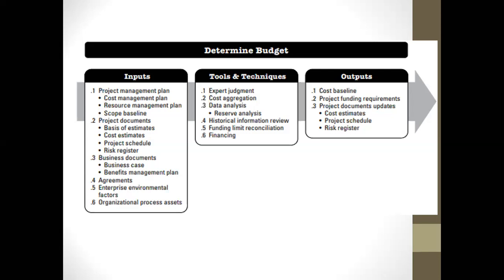If you go back to your stakeholder and tell him that this thing we budgeted at this is now maybe 25% more, and this is going to increase the project cost by 25%, some of the project managers will tell you, wait, let's see whether the price will come down. That's the changes we are talking about. If he says, okay, just go ahead, I will give you the 25% increase, please remember to document it and let it be part of the update to your project management plan. As soon as you have the update, you can go ahead.